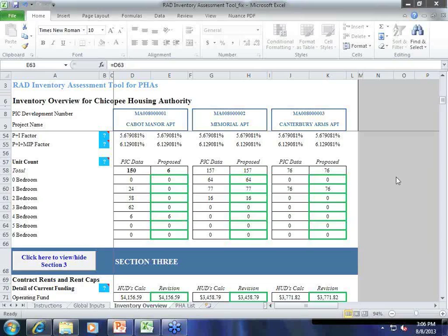Right. It varies a little from state to state, but you'll want to contact local bond counsel and find out if you should get your board to pass a bond inducement resolution so that you can count any capital improvements that you've made from the time of the bond inducement resolution to the time of closing in your 4% tax credit basis.